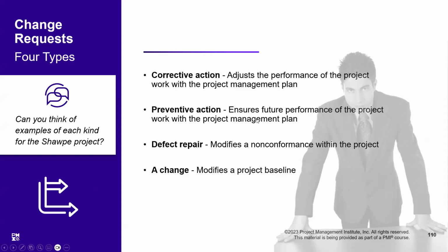Preventive action is when the damage has not yet been done, but we have uncertainty about it, and we want to give an early warning to the people doing this job to be more careful in these aspects of the project. That kind of change request is a preventive action.